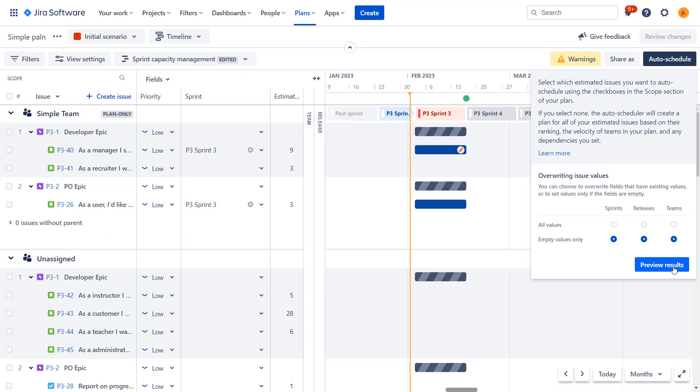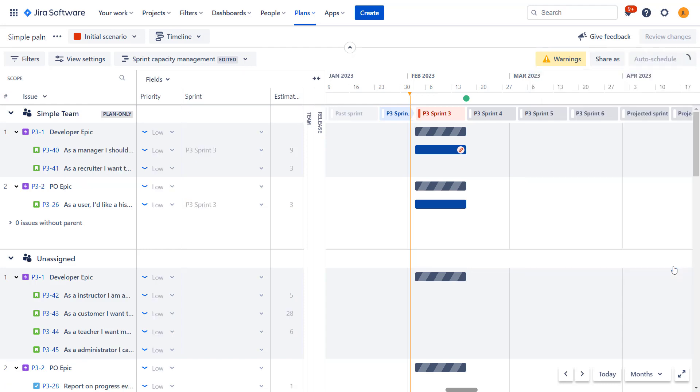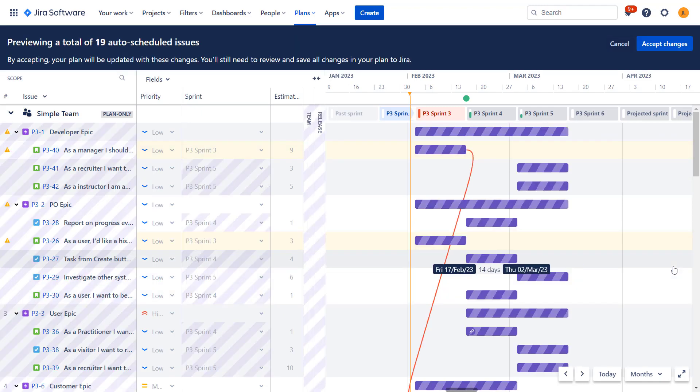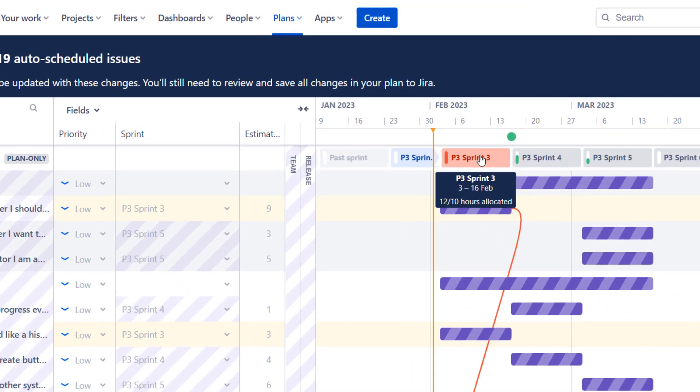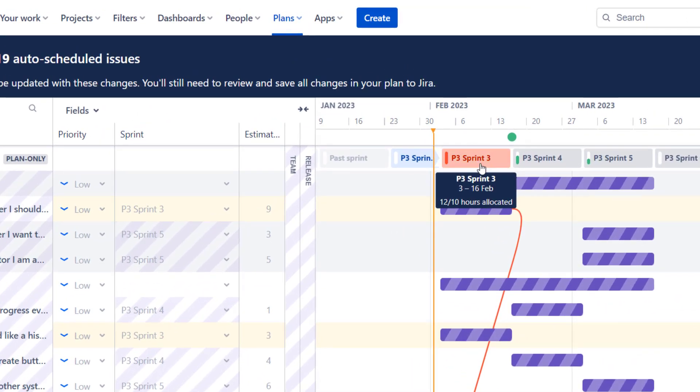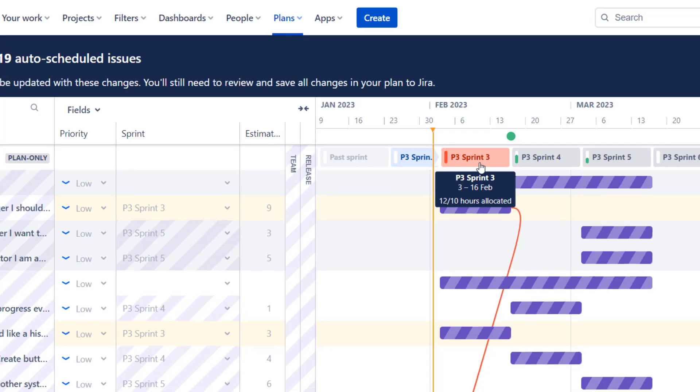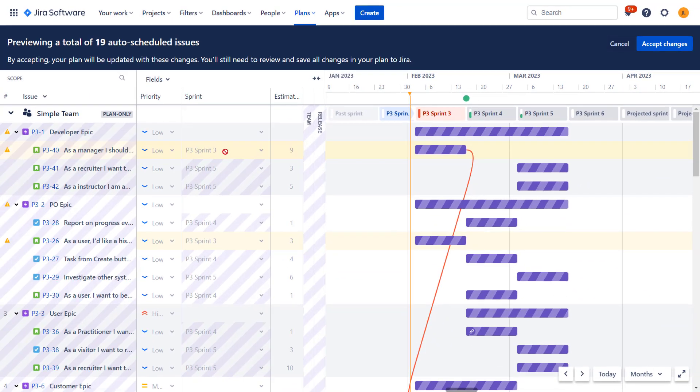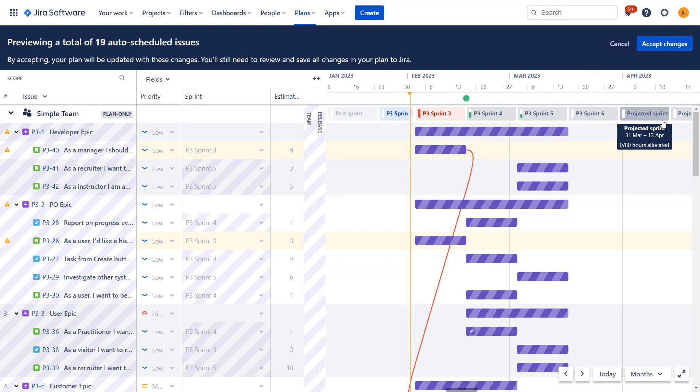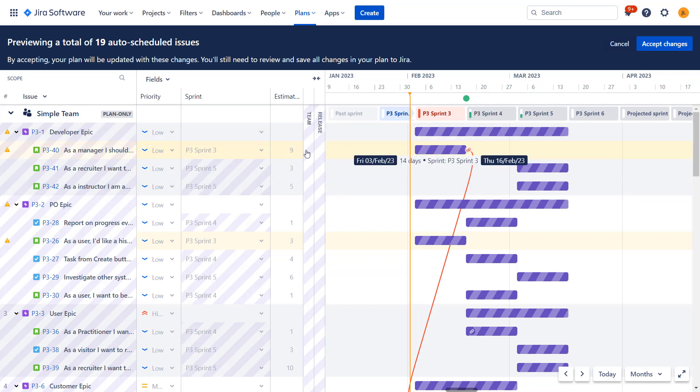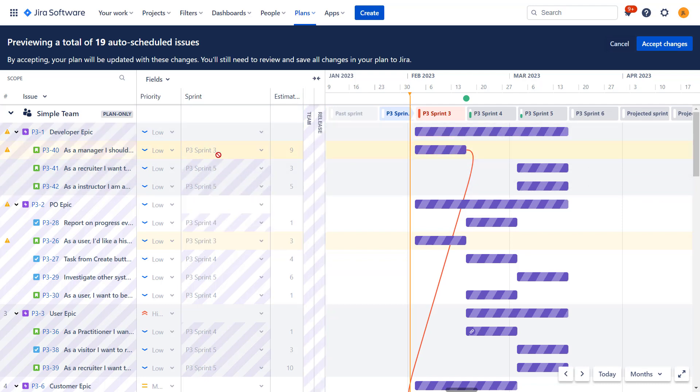And by the way, when you click on this, you do not have to worry. It will not update the plan right away. You will see the preview of the update with information, what was actually updated. So you can see that sprint three is still in the red. Why? Because those two tasks that were over allocating capacity for this sprint already had the sprint set. And when we were doing the auto schedule, we set the setting that only empty sprints or empty values of sprints should be updated. So these two remained as they were. We're still in red over here.